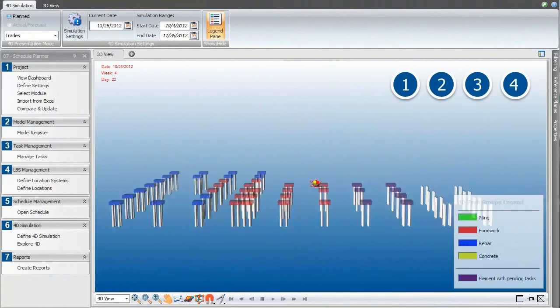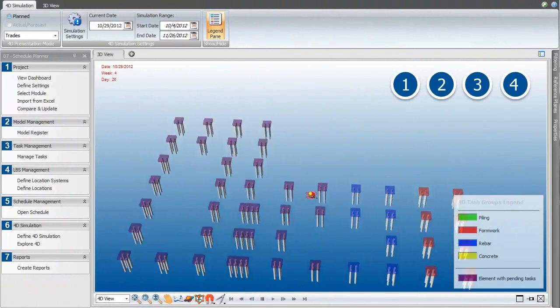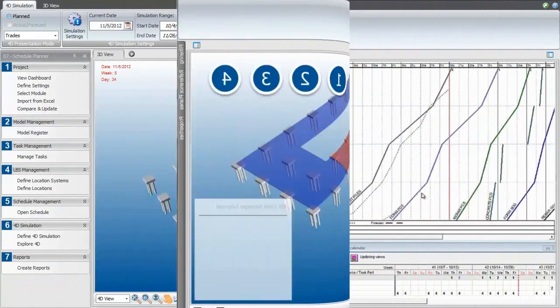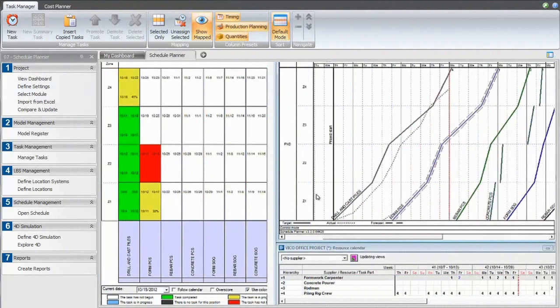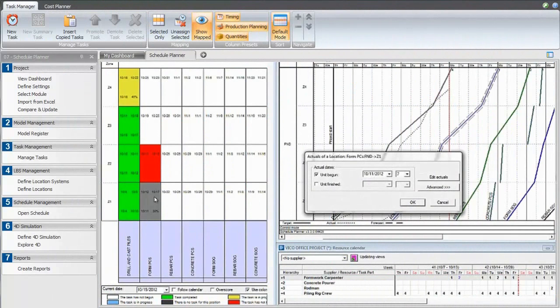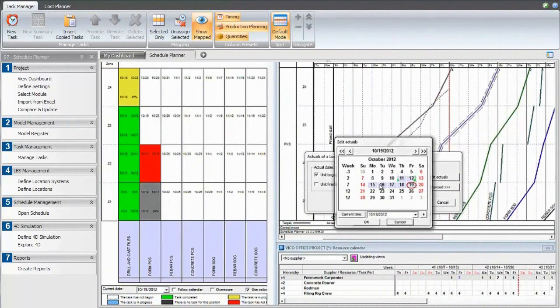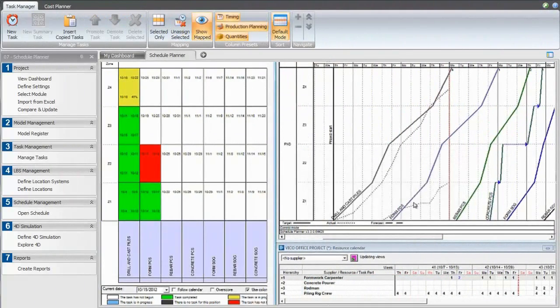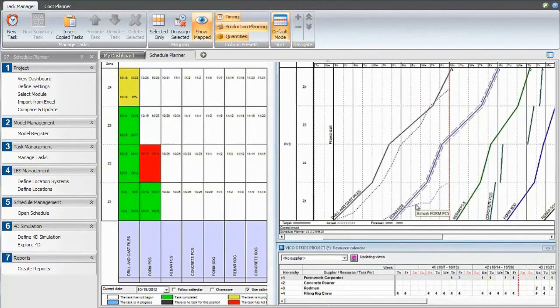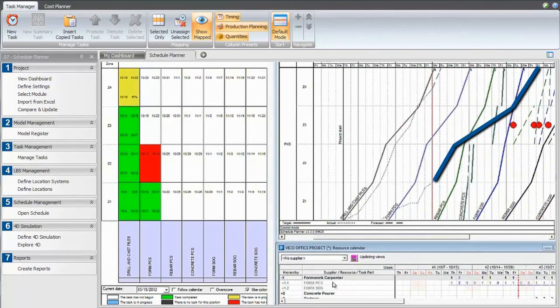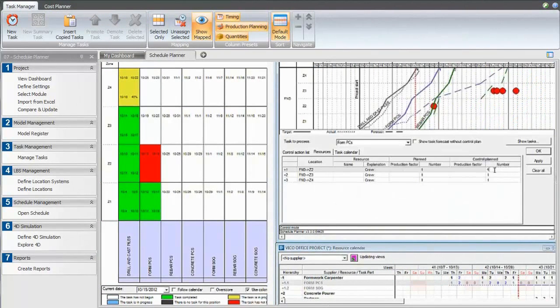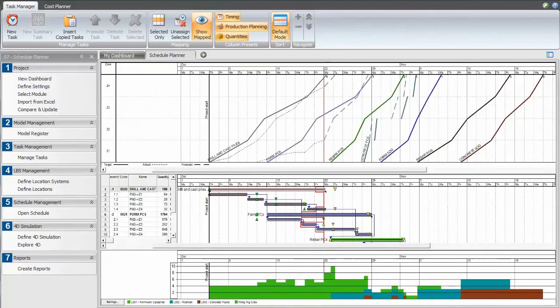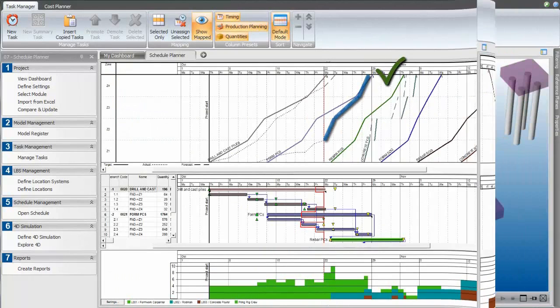As we move into the controlling phase of a project, we monitor progress against the target, review deviations in the flowline view, and automatically forecast the effect of not doing anything differently over the next few weeks. We can test control actions to define the best plan to correct any potential delays. Here we can see clearly that the subcontractor will need four crews in order to stay on target.